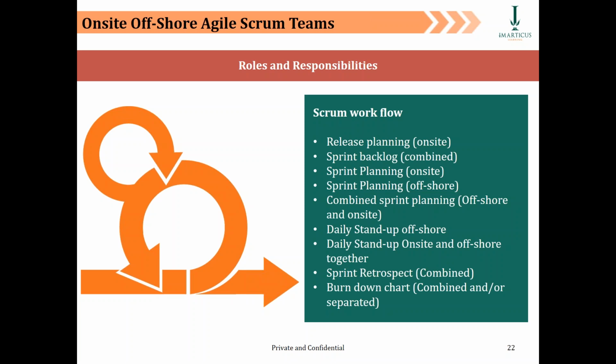Then, in a common overlapping time zone, India and UK have to do a joint stand-up meeting as well. Typically, it can be done, as I said, maybe at noon time, where the UK is about 4 to 5 hours behind you. So it could be 8 a.m. their morning, 1 p.m. your afternoon, and you can do a daily stand-up meeting. It has to be done jointly as well.